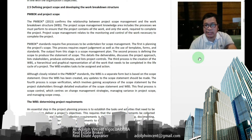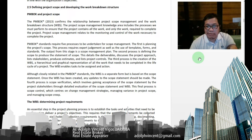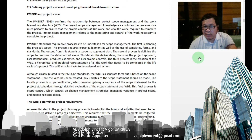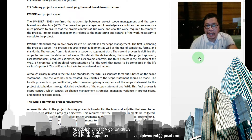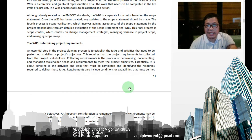The fourth process is scope verification, which involves gaining acceptance of the scope statement by the project stakeholders through detailed evaluation of the scope statement and WBS. The fifth and final process is scope control, which centers on change management strategies, managing variance in project scope, and managing scope creep. An essential step in project planning is to establish the tasks and activities needed to deliver the project objectives.